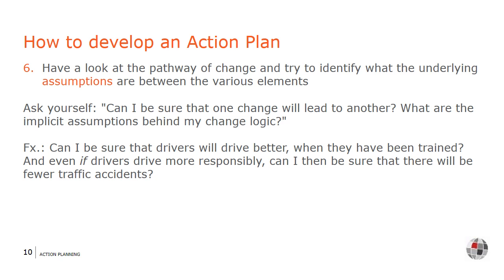If we take the example with the drivers we want to train to have fewer road accidents, you can ask yourself, can I be sure that drivers will drive better when they have been trained? And even if drivers drive more responsibly, can I then be sure that there will be fewer traffic accidents? The answers to these questions will help you identify the need for further activities for the change logic to work, and thus reinforce the chances of success of the development intervention.